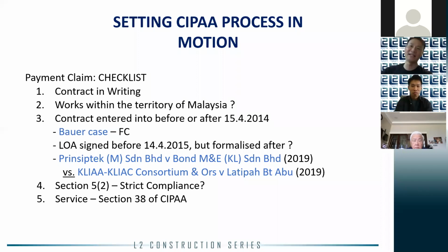Now, starting with CIPAA, setting CIPAA process in motion. Of course, the first thing that you have to do in order to set the CIPAA process in motion is to file or serve a payment claim. Now, there are certain items on the checklist which I've listed down here that you have to go through before you even file a payment claim.